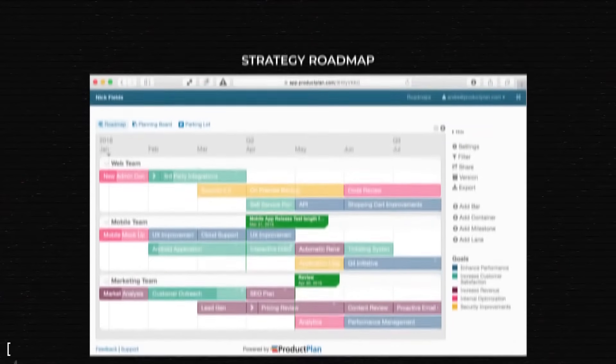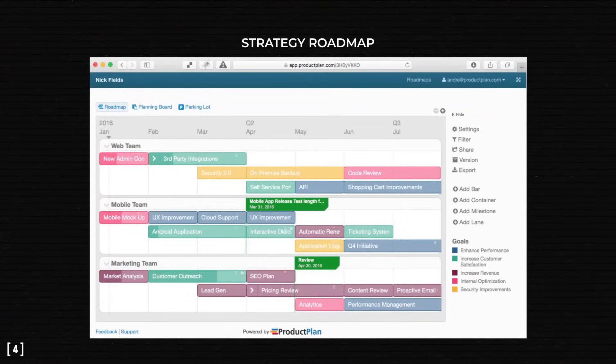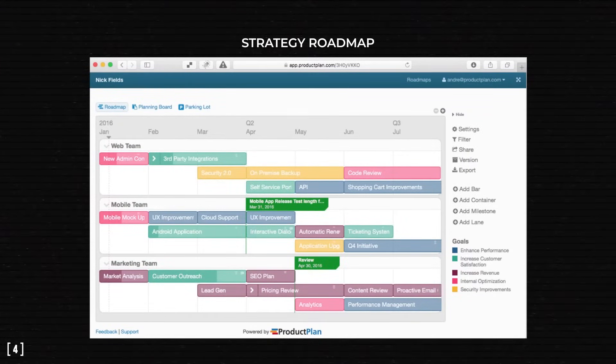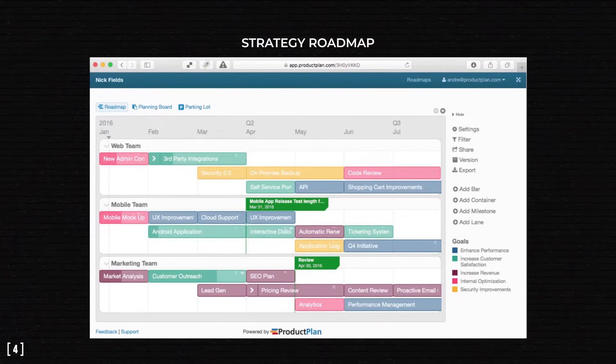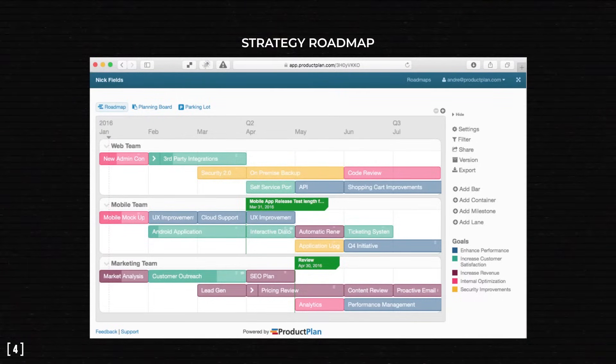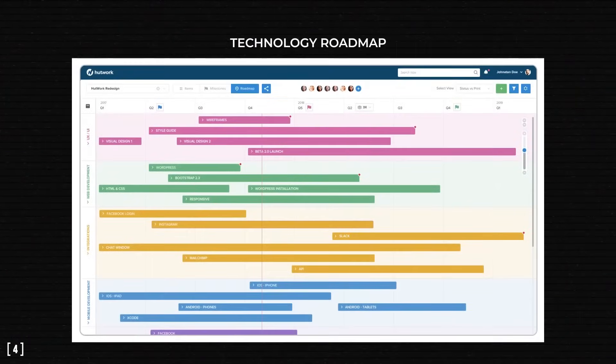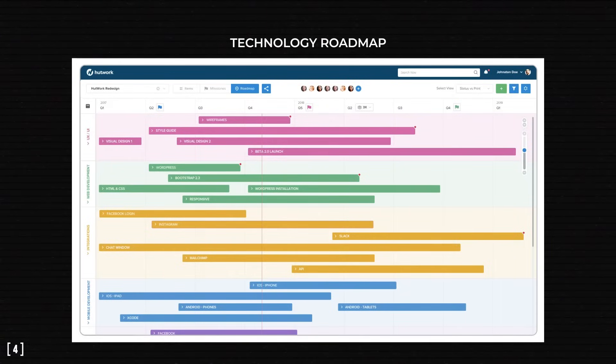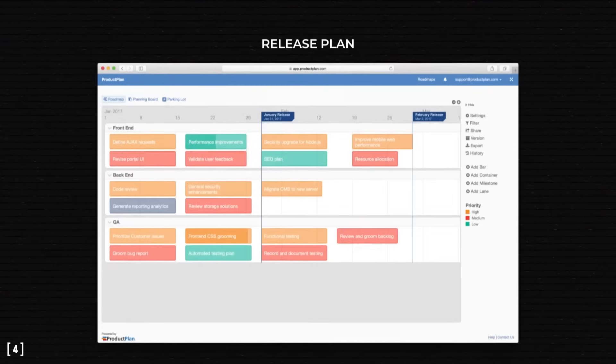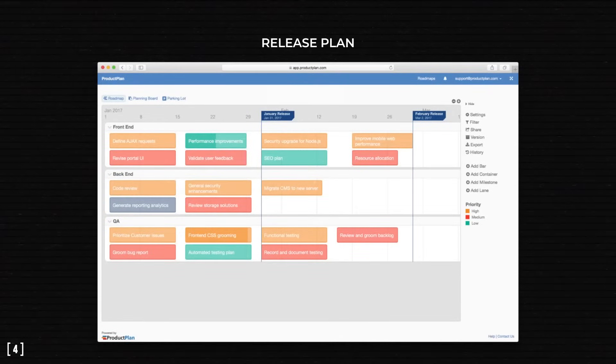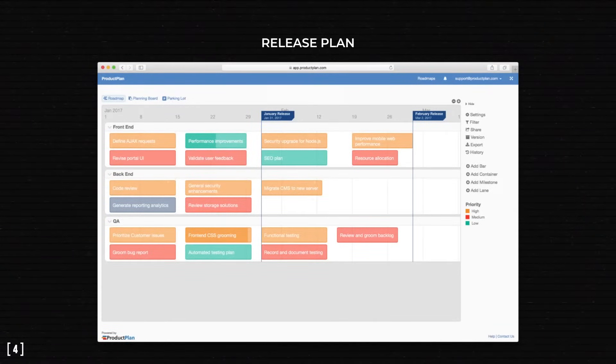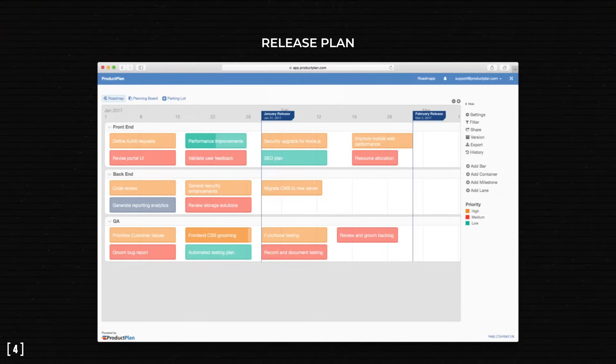There's a strategy roadmap with high-level goals and rough delivery estimates. It shouldn't be detailed because you need to view the whole project on a single screen. Then, we go low-level with the technology roadmap, which lists the smallest deliverables and their due dates. Finally, a release roadmap has strict deadlines for when each part of the project should start functioning and what features go live when.